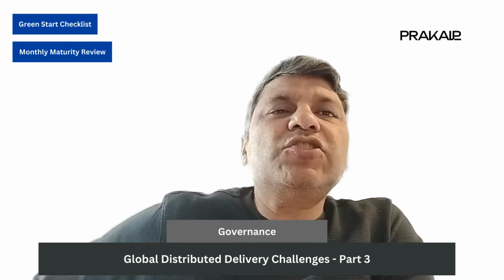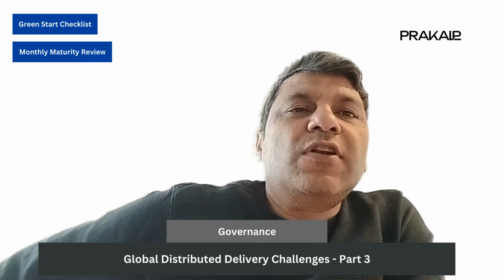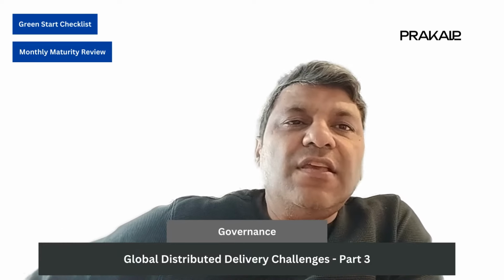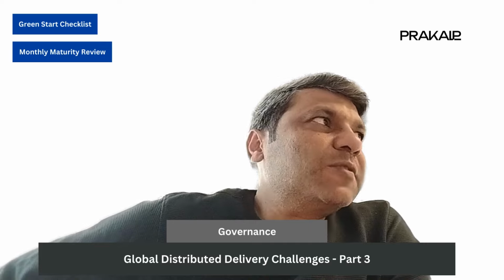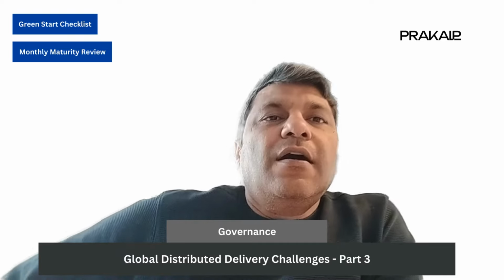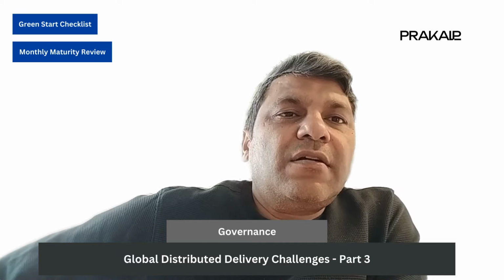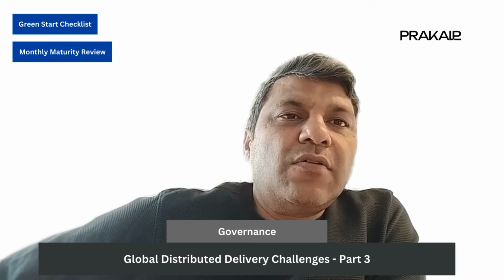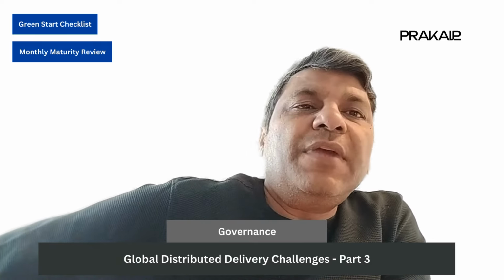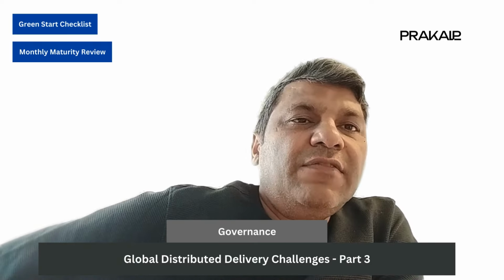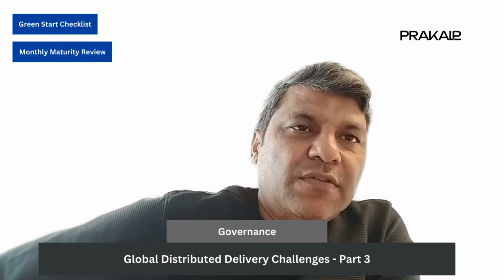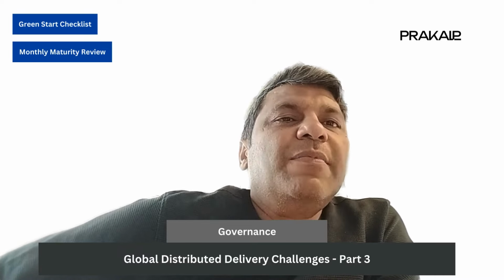The second is that there needs to be some kind of a monthly review forum across geography, in which the PMO function sits with the key stakeholders of the project across practices and across geographies on a monthly cadence. They discuss the various aspects of the project health metrics, in terms of what efforts are being made to grow the account, what efforts are being made to create value delivery for the customers, and are we even doing the right things day in and day out to deliver the project on time and within budget. So that becomes the monthly review forum.